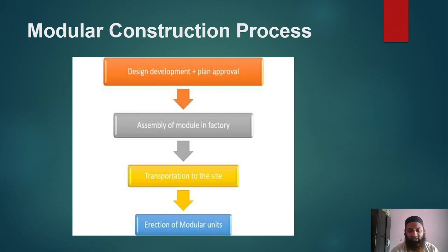Just imagine, simultaneously everything is happening. In normal construction, what happens? We need to give time to each and every element to gain its required strength. But here simultaneously everything is happening, thereby saving time.